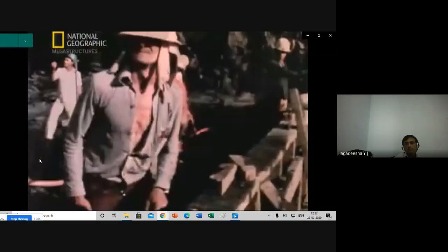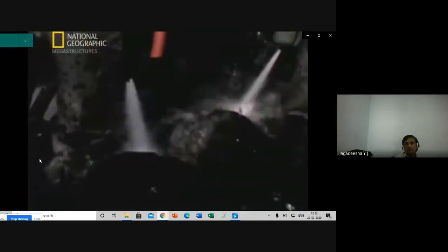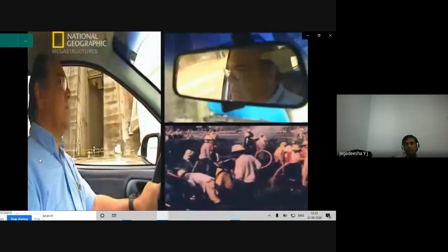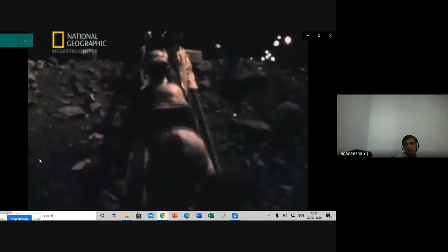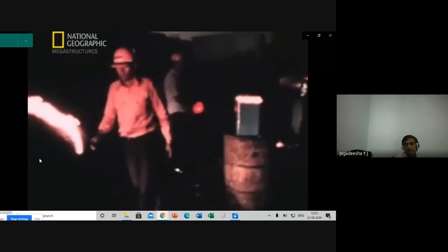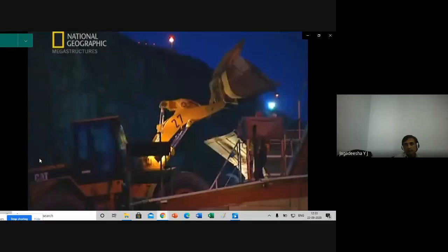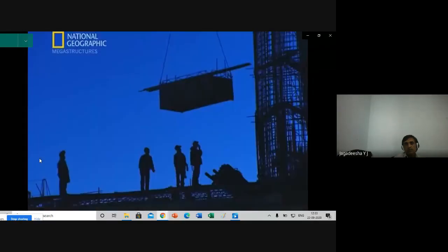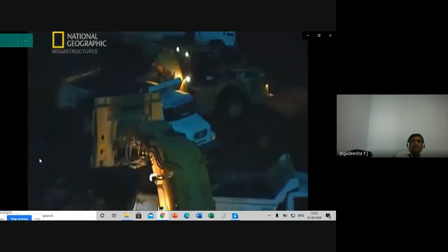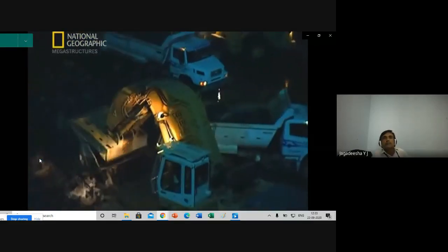As the project neared 0 hour, the pace became increasingly fierce. Adalberto Chanu ran the work schedule. During construction, we had really tight deadlines. We worked in 2 shifts of 12 hours for almost 360 days a year. The work went on around the clock. Right through the night, men and machines moved about the huge construction site in a finely tuned ballet.